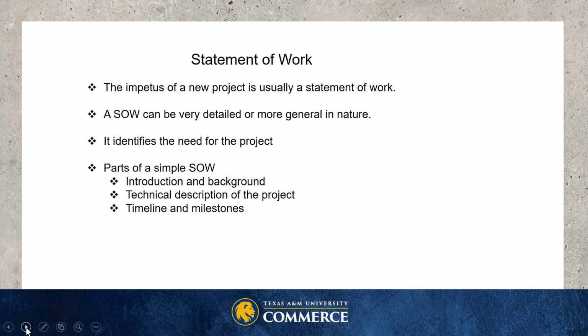So the statement of work identifies the need for the project, and generally the parts of a simple statement of work are the introduction and background, why we're doing this, the technical description of the project, and then what we're going to produce, and then the timeline and milestones that we'll be producing throughout the project.